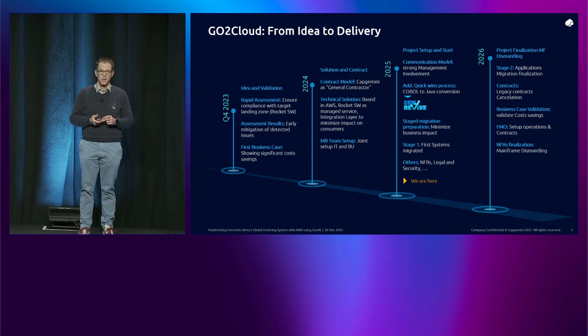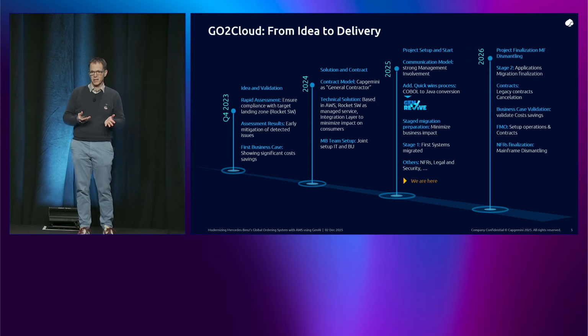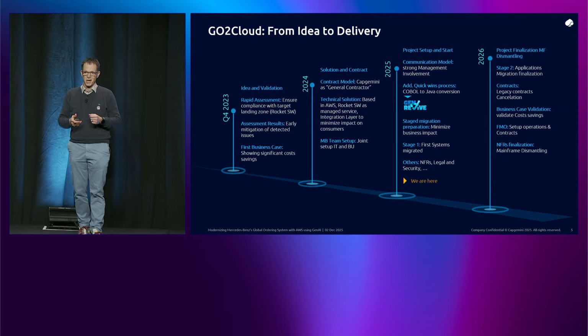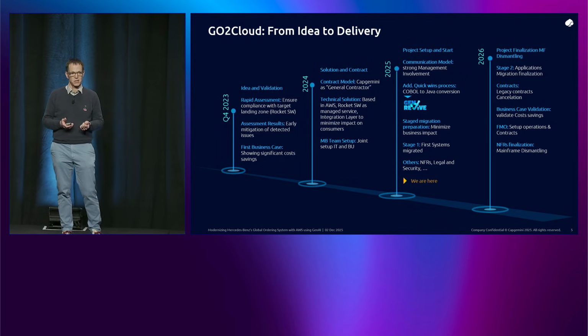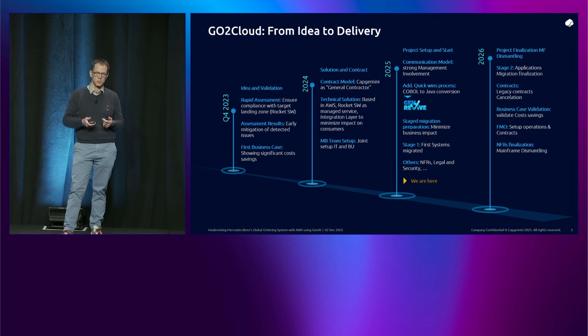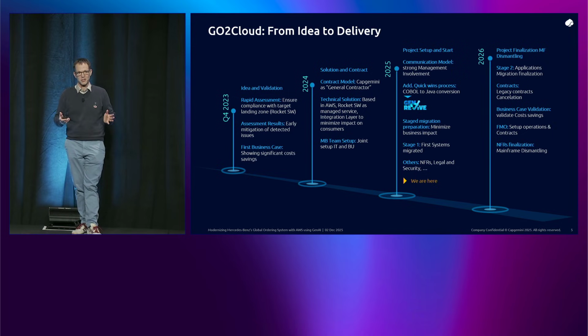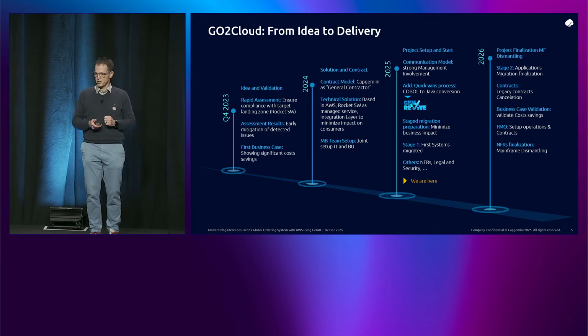And also from our perspective, a clear factor for success is that we go in stages. We start with parts of the application. In this case, we even start with some stateless services, which are part of the application, to make sure that we can really run this in parallel on the old platform and the new platform, to be sure that the new implementation on the cloud serves the same service levels as the old application.